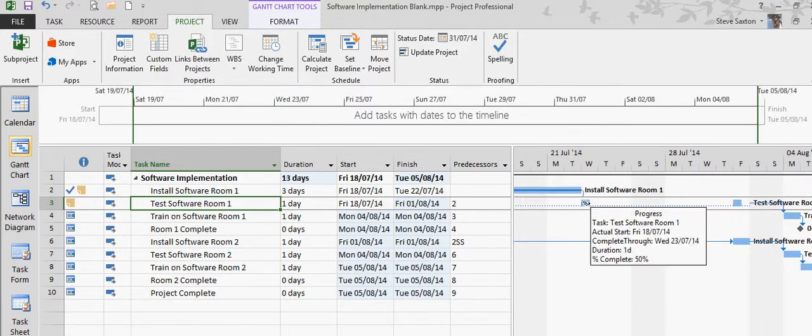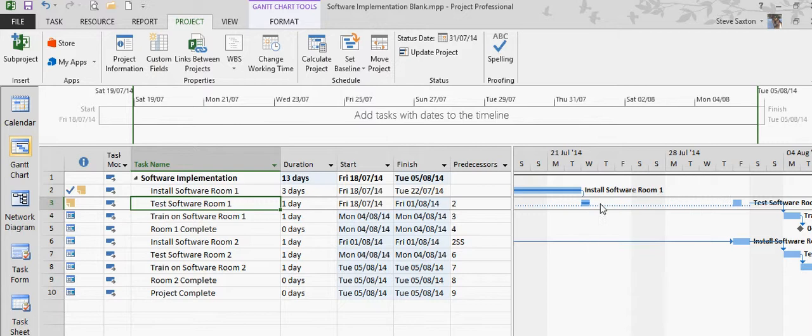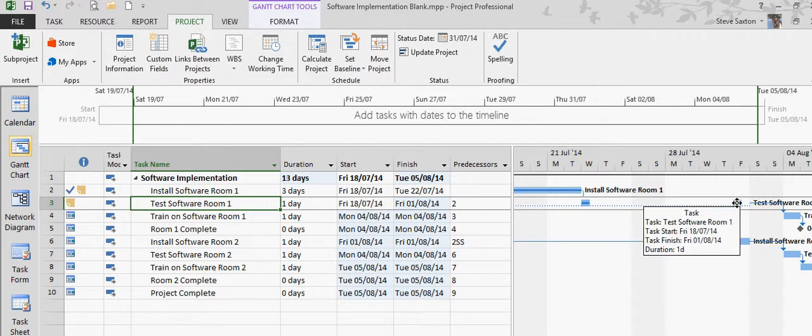One of those tasks was 50% complete, so only 50% of that task moved forward. The rest moved forward because they weren't actually started.